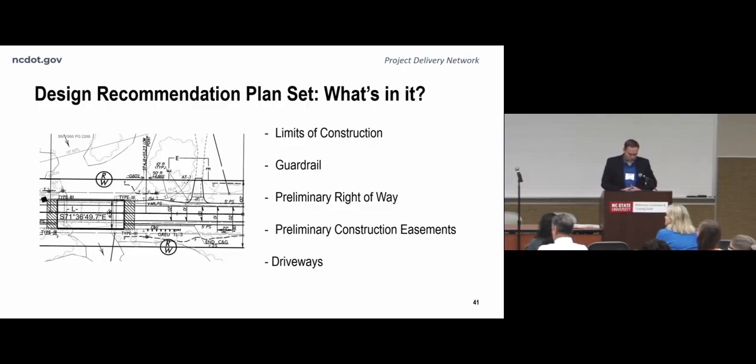that were done with our model. And these will very likely be modified later. We understand as design progresses, there likely will be additional right-of-way and easement needs for drainage, for utilities, for other things, but this is an initial look. This is an early look at our right-of-way and our easement to try to establish what we think might be those needs for this project.